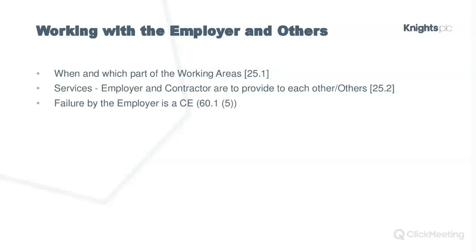That's basically pushing all that responsibility on you. And it means that you've got no way of claiming a compensation event, because you can't say, oh, employer hasn't complied with this clause, because they're just generally allowed on site, generally allowed in the working areas, etc. And that is usually what I see. So just be careful about that, because that is pretty much changing the risk.